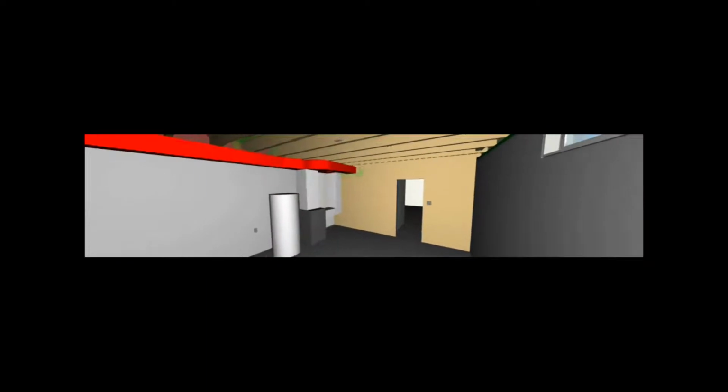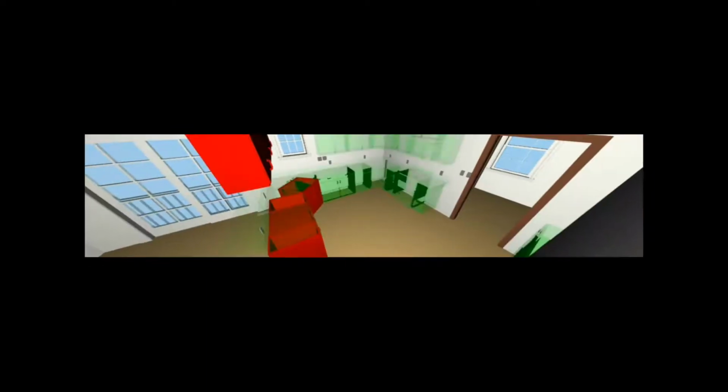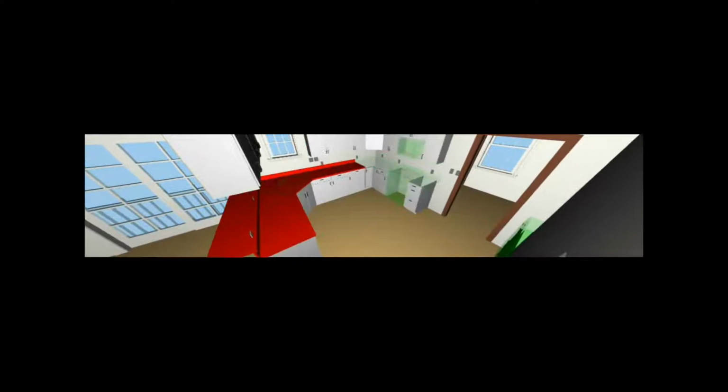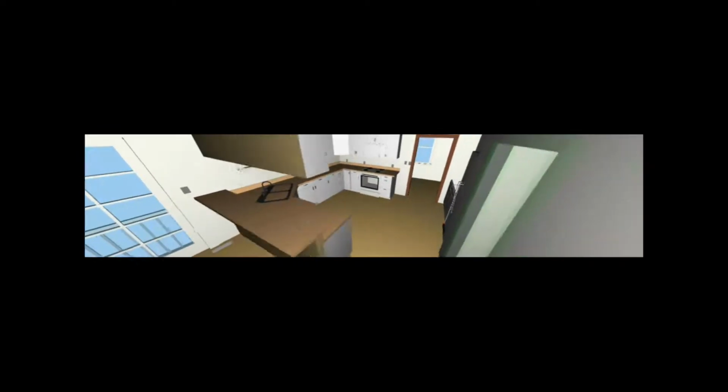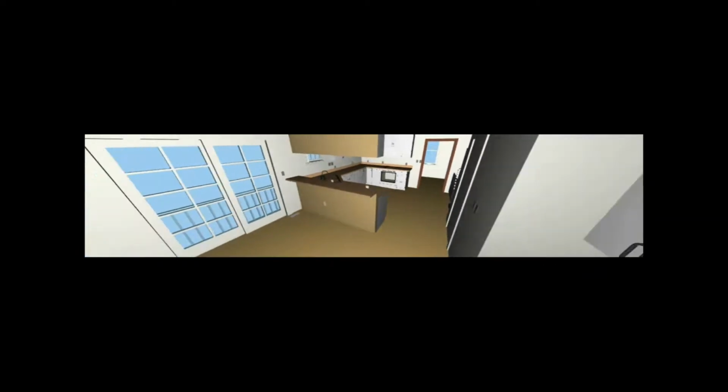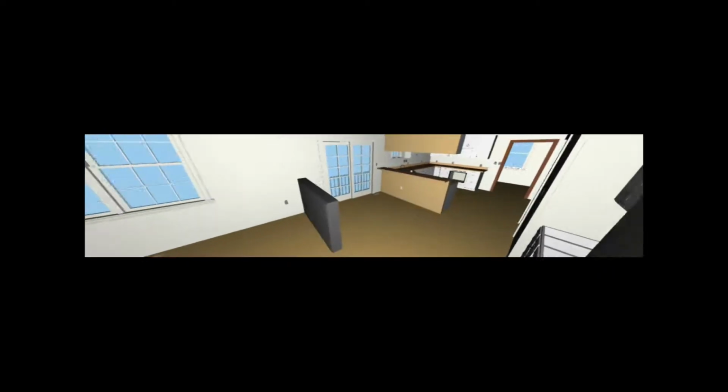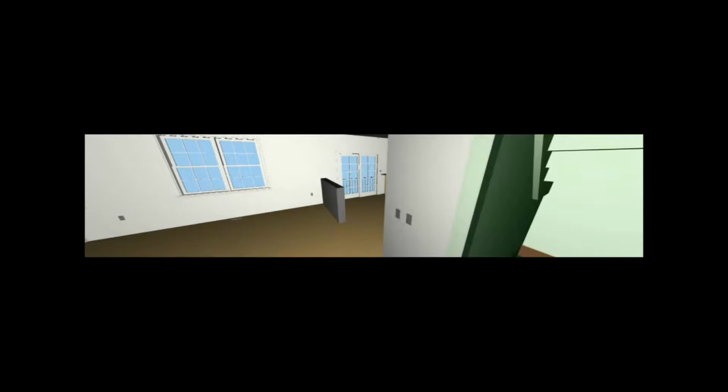What we're going to do now is go inside, and you'll see some of the dependencies, the time dependencies that become graphically represented. So now as we go into the house, you'll see that we have the HVAC system and the ductwork going in, and then as you see what's coming into the kitchen, you'll notice the outlets go in place before the cabinets. Now that's important because that's a time dependency. The electrician and the services need to be roughed in before the finishes are put in place. So those types of things become visually apparent in our 4D model.